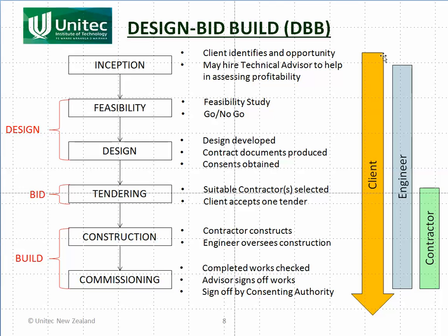You can see that the client comes in right at the start and is there furthermore when he starts using it. The engineer starts in early and finishes when the project is commissioned and handed over to the client. And the contractor starts in usually about tendering, and he finishes at commissioning and handover as well.